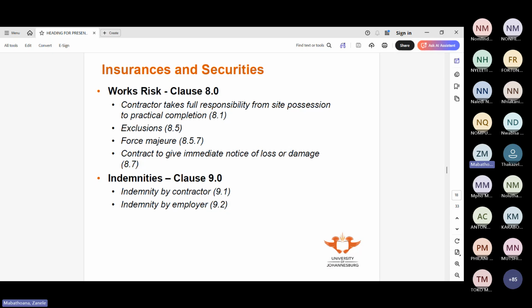So let's say you're building a completely new road. In the Eastern Cape, we decide we want to connect my grandmother's village, Mkemani, to Matatiele, because that's the closest town, right? Or is it Mount Frere? Yes. Or you want to connect Mkemani to Mount Frere. There's no road there. Very close to each other, but there's no road. First of all, you don't know what the soil conditions are there. So when you do your planning, you would have done your geotech and all of that. But once you start digging, you may find that there are certain things you missed. So you expect those variations.